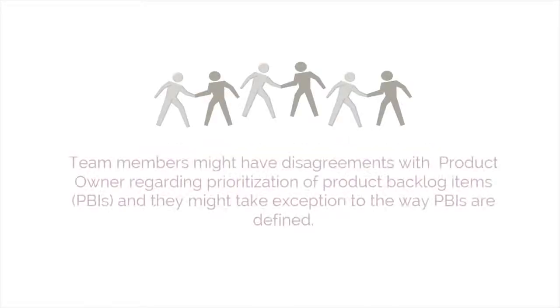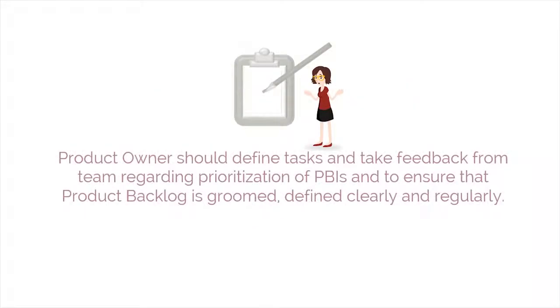Remember that there can be issues while creating a product backlog. In some cases, the team members might have disagreements with the product owner regarding prioritization of product backlog items, PBIs, and they might take exception to the way the PBIs are defined. So, it's a good practice for the product owner to define the tasks and take feedback from the team members regarding the prioritization of PBIs, and to ensure that the product backlog is groomed and defined clearly and regularly.